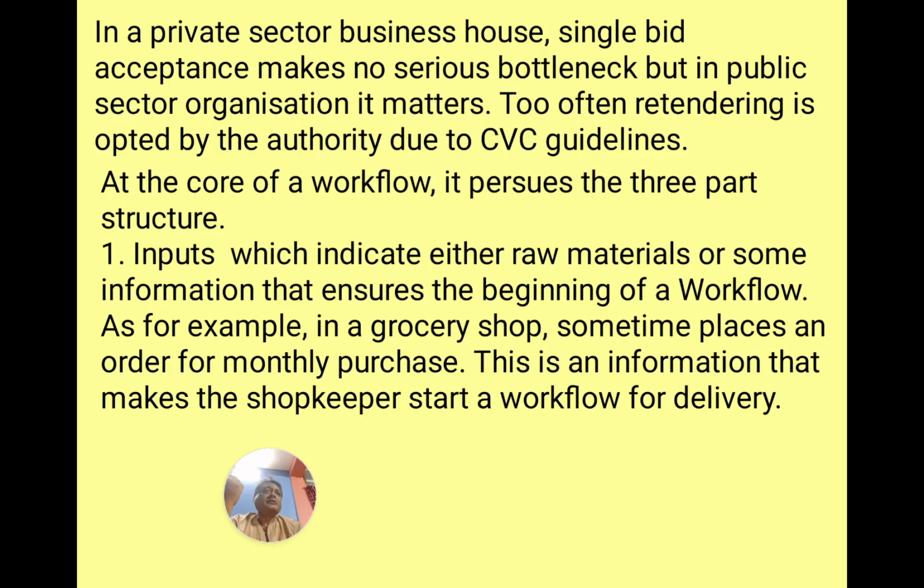A single bidder has appeared. In the private organization, if the job is to be done immediately, then the bid of the single bidder will be accepted without any dispute. It is possible in the private sector business house that single bid acceptance makes no serious bottleneck. But in a public sector organization, it matters. That is, the single bidder matters.